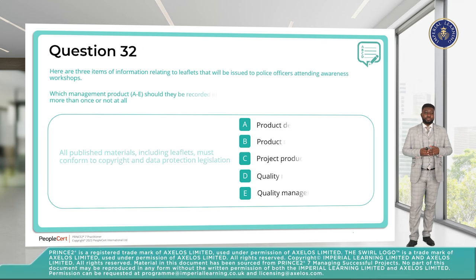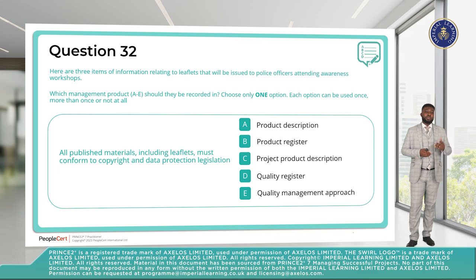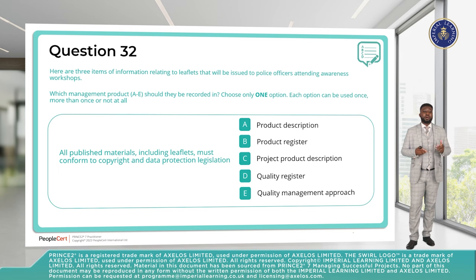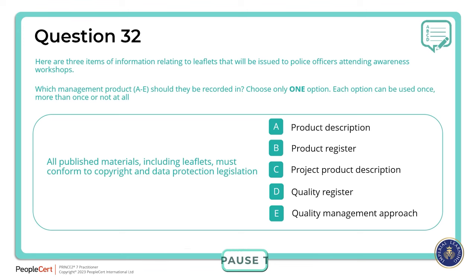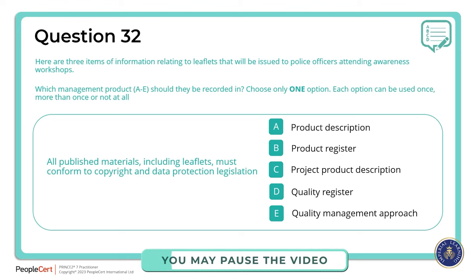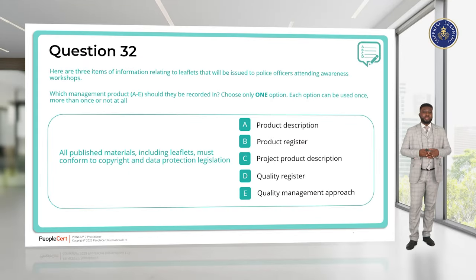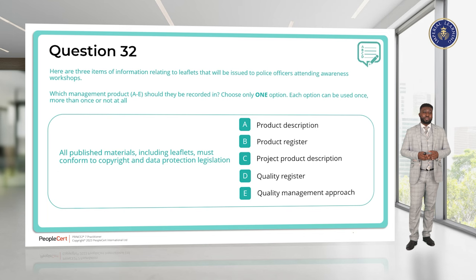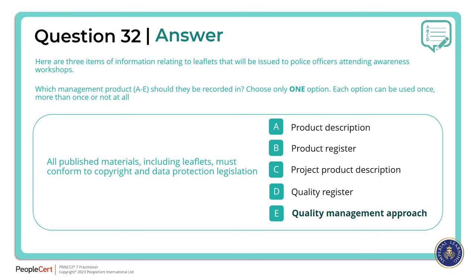Question 32. All published material including leaflets must conform to copyright and data protection legislation. This kind of overarching rule that the organisation must comply with — such as GDPR conformance — will be recorded in the quality management approach. The answer is E, quality management approach.